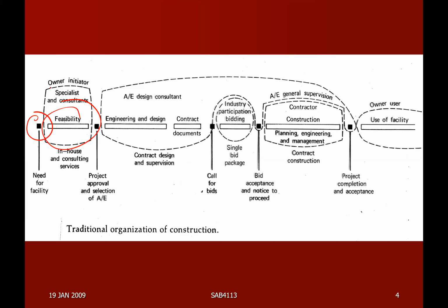And then the architect and engineer will do the design and engineering design. They need to produce drawings. They need to come up with the specification, and then the QS will help in coming up with all kinds of BQ, with all kinds of terms and conditions, because we engineers do not know much about that. The QS would know. That is produced for the purpose of tendering.